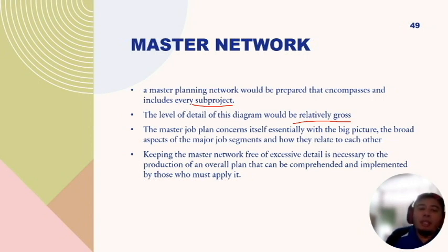The master job plan concerns itself essentially with the big picture and the broad aspects of the major job segments. You should consider only major job segments. For example, if it is piling work, then it is piling of the abutment only. You don't have to detail it out to setting out of piles and mobilization of machinery.